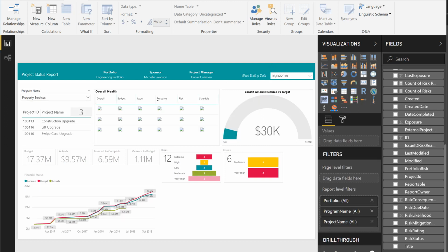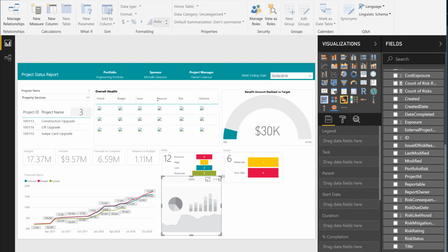Great. The next thing I want to create is the program Gantt chart. Now this one can be a little bit fiddly, I'll be honest with you. And again, this is just because of the different timeline views that are available to work with, and these road mapping visualizations, there aren't too many. So I guess what we want to see is the project name, the start and finish date, and the percentage complete plus the duration. So this is how it works.